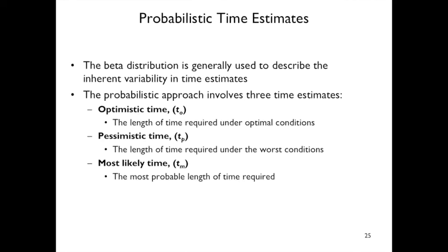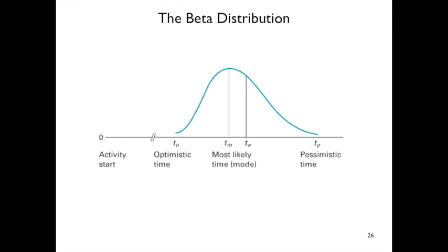Probabilistic time estimates use a beta distribution to describe inherent variability. There are three approaches: optimistic time (under optimal conditions), pessimistic time (under worst conditions), and most likely time (the most probable duration). For example, worst case is four days, most likely is three days, and most optimistic is one day. There's often a beta distribution between optimistic and pessimistic, and you might use a slightly pessimistic estimate — the T expected (Te) — for your planning.